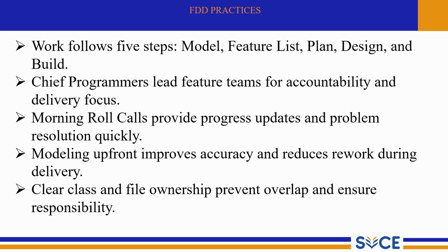And the next one is morning roll calls, which provide progress updates and quick problem resolution. Similar to Scrum's daily stand-up, FDD uses short roll calls where team members report progress. This creates transparency, allows issues to be raised early and keeps the team moving without delays.